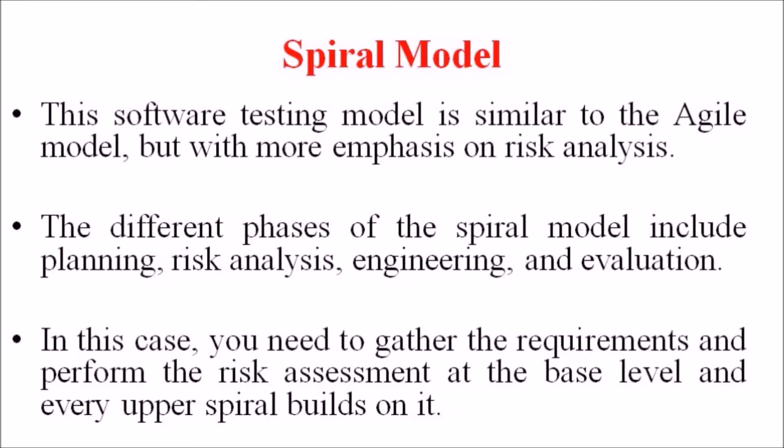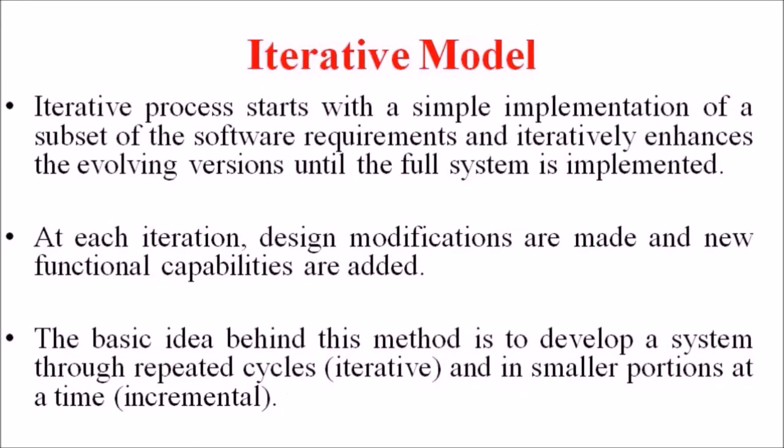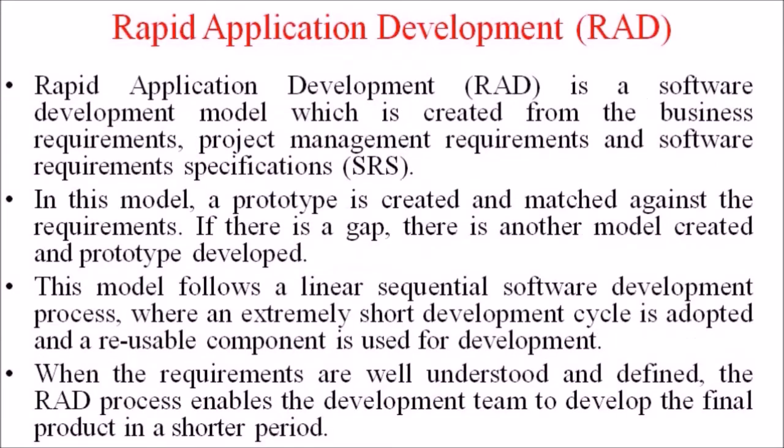In the spiral model, we need to gather the requirements and perform the risk assessment at the base level, with every upper spiral building on it. In the iterative model, the process starts with a simple implementation of a subset of the software requirements and iteratively enhances the evolving version until the full system is implemented. At each iteration, design modifications are made and new functional capabilities are added. The basic idea is to develop a system through repeated cycles and in smaller portions called increments.